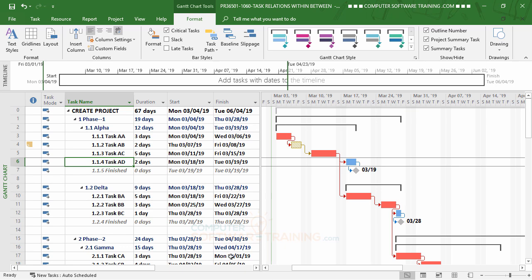Another area we can change around a little bit are the days that we have off. Now, we haven't really talked about this yet. We're going to be talking about it soon. When you're looking at your Gantt chart here, the gray area, those vertical lines, are what we have off. The calendar right now, and we can change the calendar too, is set up so we work Monday through Friday, we've got Saturday and Sunday off, and we do that 52 weeks a year. So what it's showing you here in the gray, obviously, are your days off.